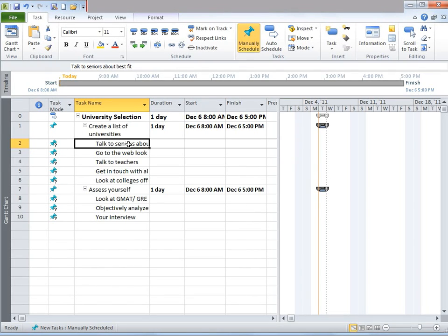Second task must follow the task preceding it, which means a sequence. Second task can be initiated only if the task preceding it is completed, which means there is a dependency. A task whose start or finish date determines the start or finish date of its successor task is a predecessor task. A successor task is one whose start or finish date is driven by its predecessor task.